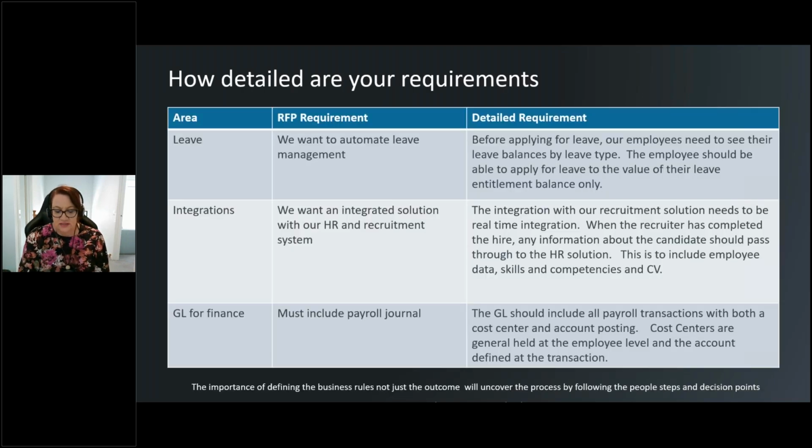One of the first things that a vendor is going to do once you've started a project is come on site and do some detailed requirements. We call these our discovery workshops, and then we provide you a document with advisory on using the system. It's really important that you know what your requirements are. The gathering of business requirements is pretty critical. It creates a complete set of what we're going to be setting up the system for, and enables better planning, more accurate cost estimates, shorter delivery cycles, improved customer satisfaction, and the adoption of the final product.